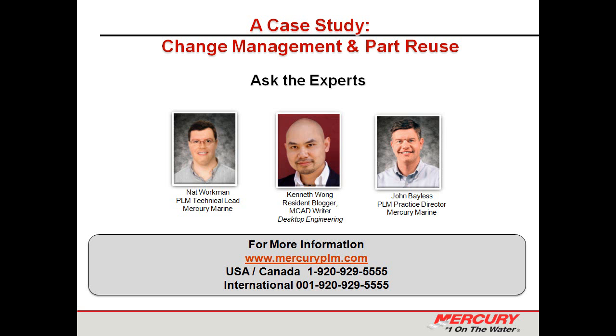Yeah, the other thing is on a recurring product change. For example, if somebody has a cost change to the product because they redesigned a part, you can look at the change impact to the product beyond just the part itself. For example, from a manufacturing perspective, will the processes have to change? Or from a quality and inspection perspective, will the quality impact or the gauging have to change? And so you look at the entire life cycle of that change.